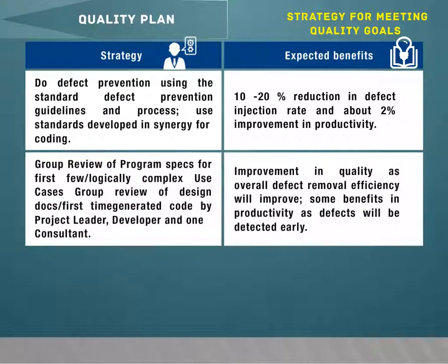Group review of program specs for first few or logically complex use cases. Group review of design docs or first-time generated code by project leader, developer, and one consultant. Improvement in quality as overall defect removal efficiency will improve. Some benefits in productivity as defects will be detected early.